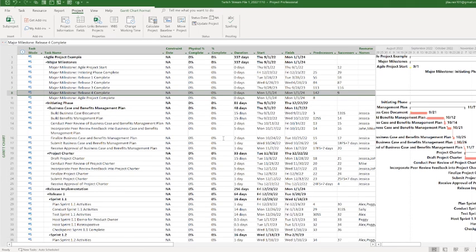And it associates your low level tasks with the WBS, which does not make sense, because the purpose of a WBS is to decompose the scope to a level that is definable, specific, and that you're able to associate cost, schedule, and resources to. Whereas the automated WBS in Microsoft Project doesn't necessarily do that.